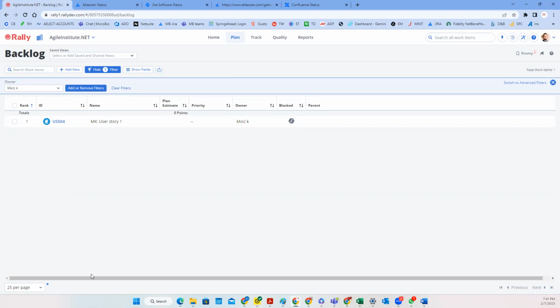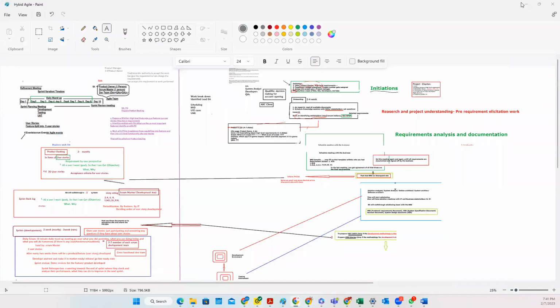In Agile, we create user stories, which become a backlog, and this serves as input for the Agile team to work on. You work with the product owner, who is the owner of that backlog, and he or she will give you the requirements for your user stories, acceptance criteria, details, and then you will update that. That's what we will recreate.